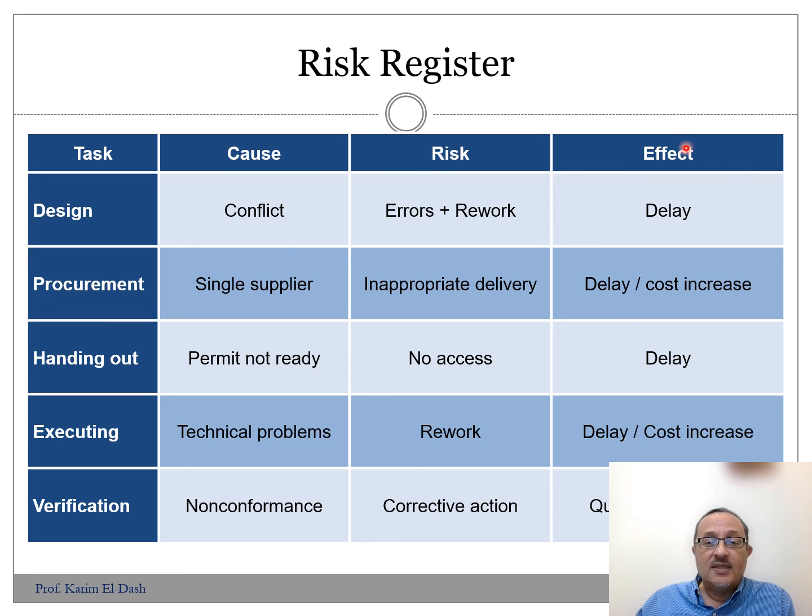The effect of that is kind of a delay. If the design could be corrected in the design phase, the delay will be a little bit smaller. If the design could not be corrected in the design phase and we have to correct that by making some rehabilitation or some rework during the execution phase, in this case, the delay will be longer.